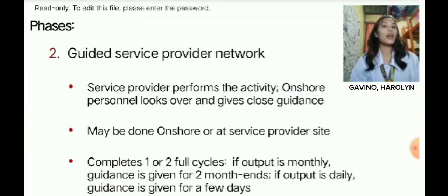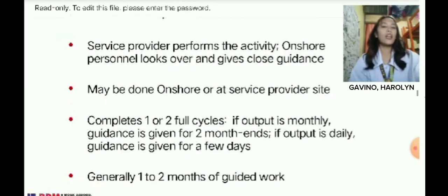Number 2, guided service provider performance. The service provider performs the activity, and onshore personnel look over and give close guidance. This may be done onshore or at the service provider site.